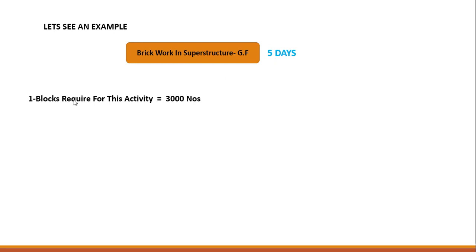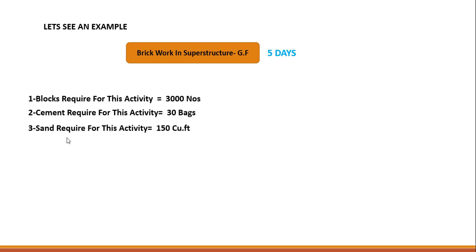days. Now for this activity we need blocks as 3000 numbers and cement as 30 bags and sand we require as 150 cubic meter. And I arrived at this calculation from the drawings. You can calculate all of this data from the drawing.